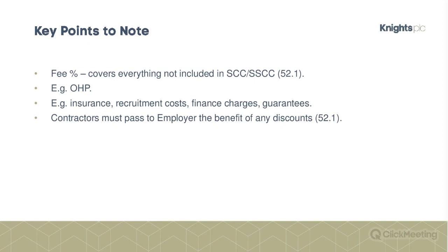With options C, D and E, obviously it's not just for compensation events, it's for the work throughout the project. Again, you use the schedule of cost components this time to calculate what you're entitled to. That's part of your defined cost. The other part is your subcontracted costs, so they're added up, and then the fee percentage gets added to that.